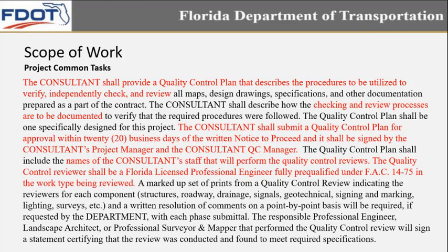The names of the consultant staff that will perform the quality control reviews, and the quality control reviewer shall be a licensed professional engineer, fully pre-qualified in the work type being reviewed. To quickly summarize, the project-specific quality control plan needs to outline procedures to be utilized to verify, independently check, and review.